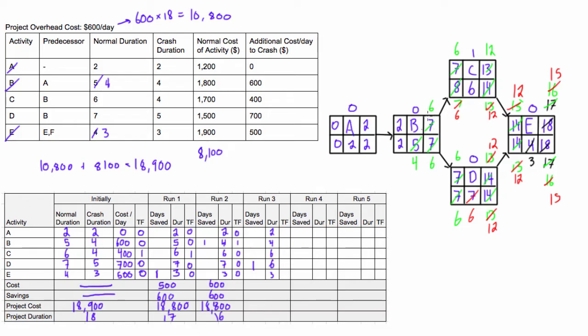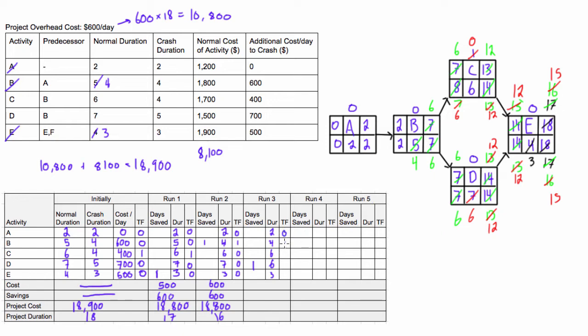All right, let's reevaluate what we have for all of our total floats. These guys remain the same. 6 minus 6 is 0. 12 minus 12. This one becomes 0 finally. Now it's part of our critical path. 12 minus 12, that's still 0. And 15 minus 15, that's still 0. So now every activity on this whole network diagram is critical. So let's go and let's add that in. So now our total float, we're gonna have 0, 0, 0, 0, 0, right? So now you're seeing finally that 1 has finally disappeared from total float for activity.